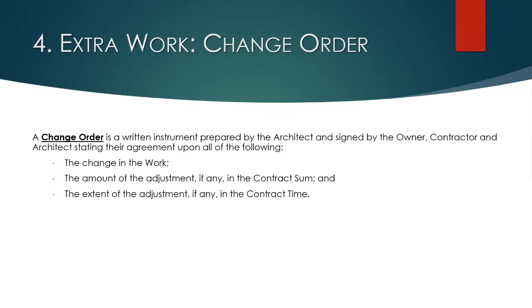The definition of change order, taken from the AIA documents, is a document that's executed by all of the parties. This is just an example as it relates to the prime contract, but it would be a mini contract that everybody's signed. Certainly you can eliminate the need for the architect to sign the change order, depending on the size and type of the project.